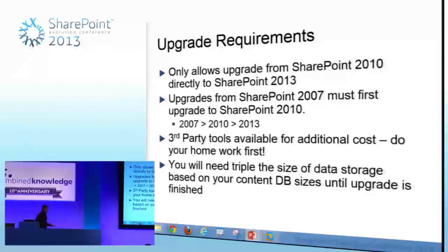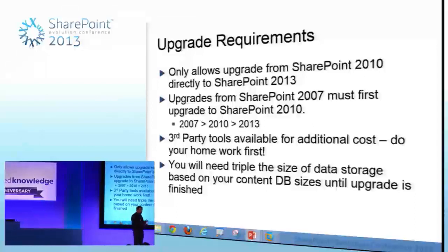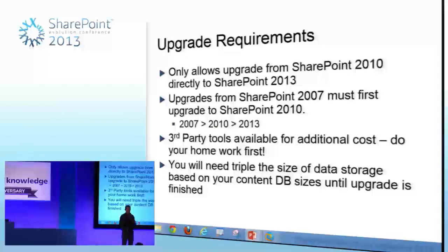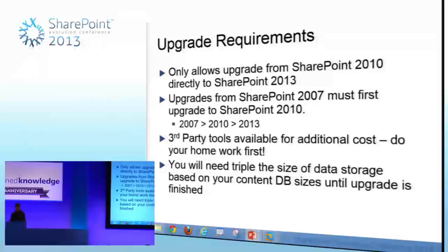Data storage, I'm going to touch on that because this is a really important point around upgrades. Make sure that you understand what your current storage capacity is. With upgrade, you're going to at least triple your data requirements to be able to do a proper upgrade. Because when an upgrade runs, it balances it out, and so you'd find that suddenly, even if your content database is about 10 gig, it'll triple its size before the upgrade is finished. So just be aware of those things, because you've got to think about logs and all the rest of it.